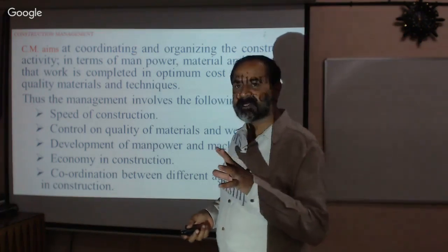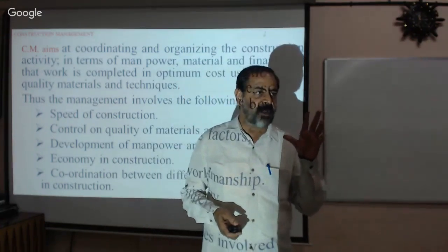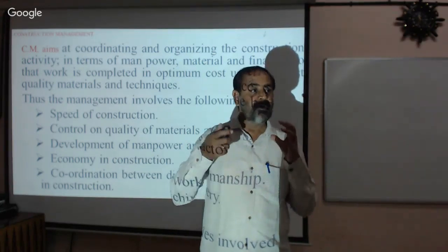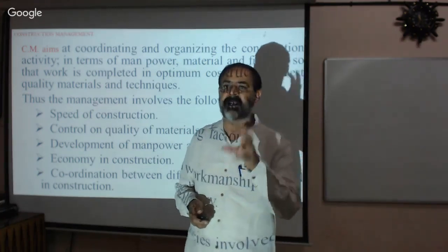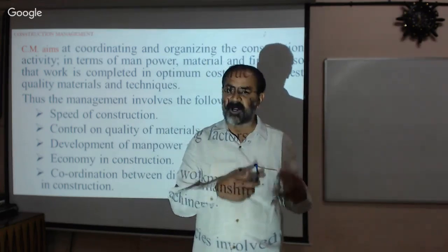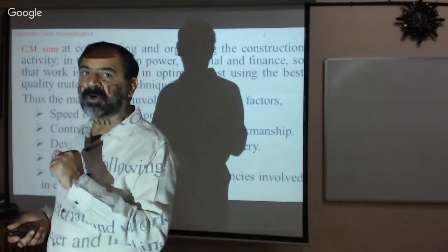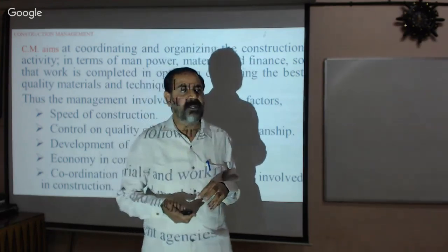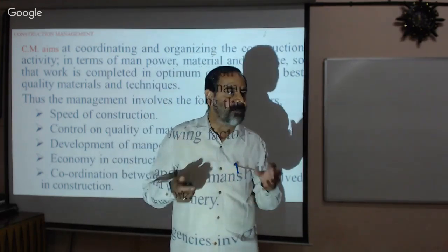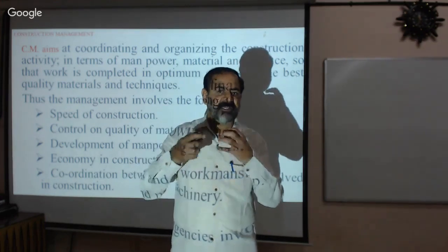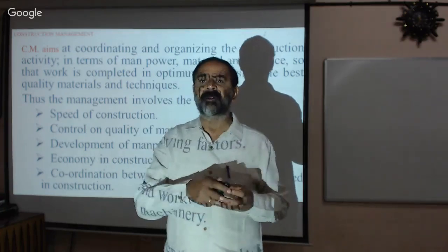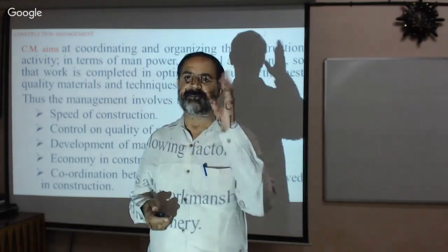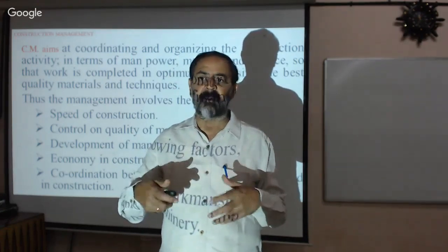For example, in the construction of a dam, if you are the project manager, you need to set up the best available technique, because thousands of cubic meters of concrete will be poured. Suppose you are a project engineer for an apartment, and during concreting of the foundation or footing we may need 100 cubic meters of concrete. Procuring the material at site, then getting the people and machines, preparing the concrete and pouring it is a tedious job. It may take 2, 3, or 4 days. This is the usual way people do it.